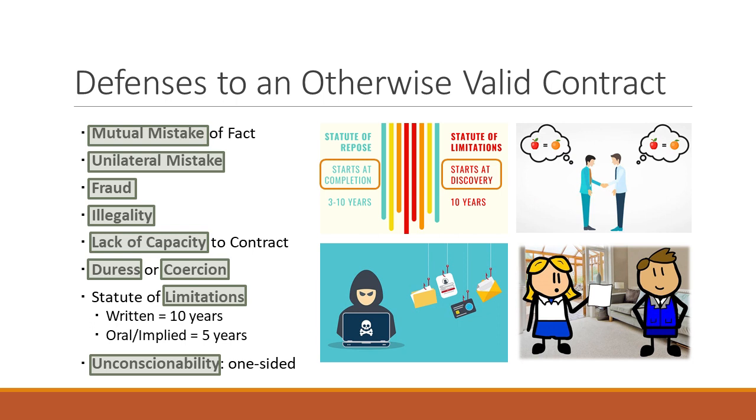And so if you enter into this oral agreement between owner and designer, and the owner says to you it's residential, and that's all you have, and you say, I'm going to do it for $150,000, industry standard generally says that the architect is not responsible for determining the facts and information about the ground and where the property is going to be built when they enter into that agreement. Now, a good architect might start to do that because they may be charged with getting permitting and such.